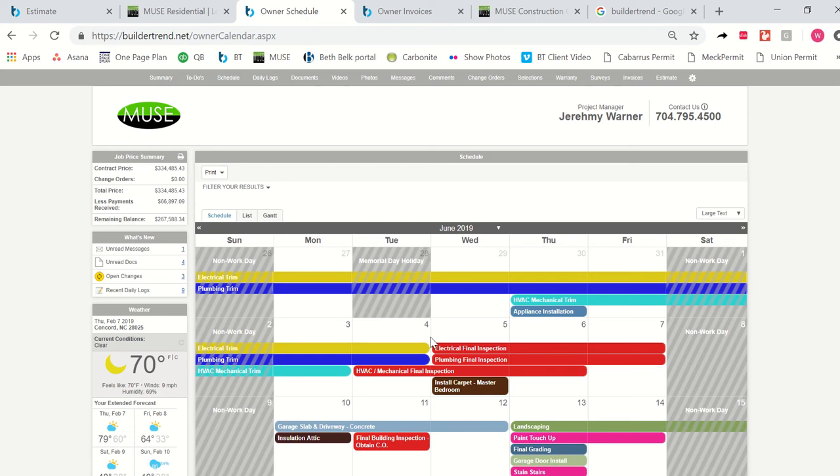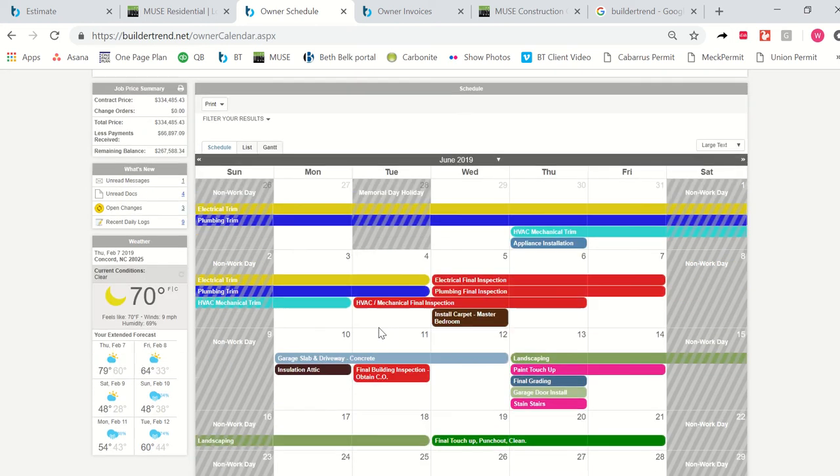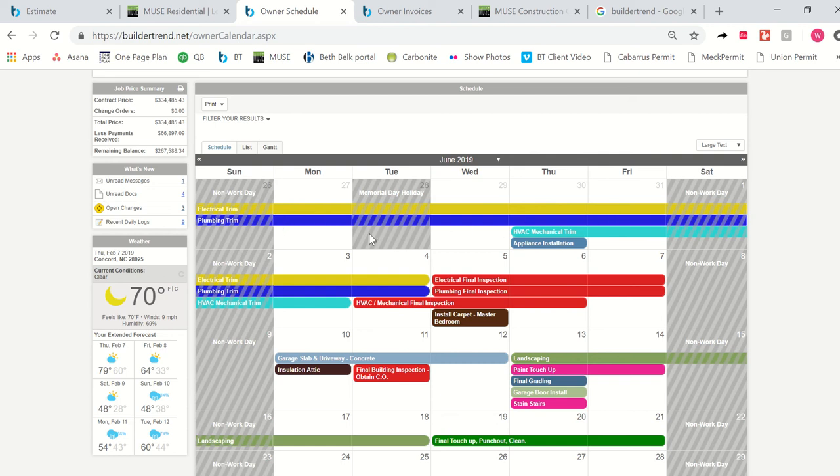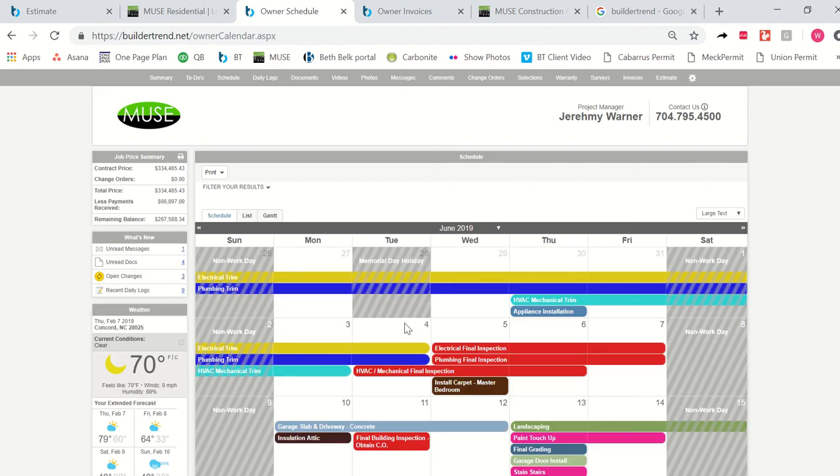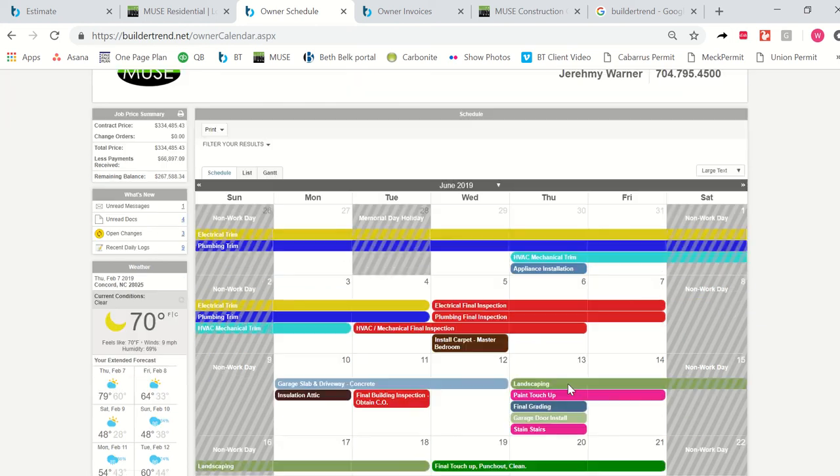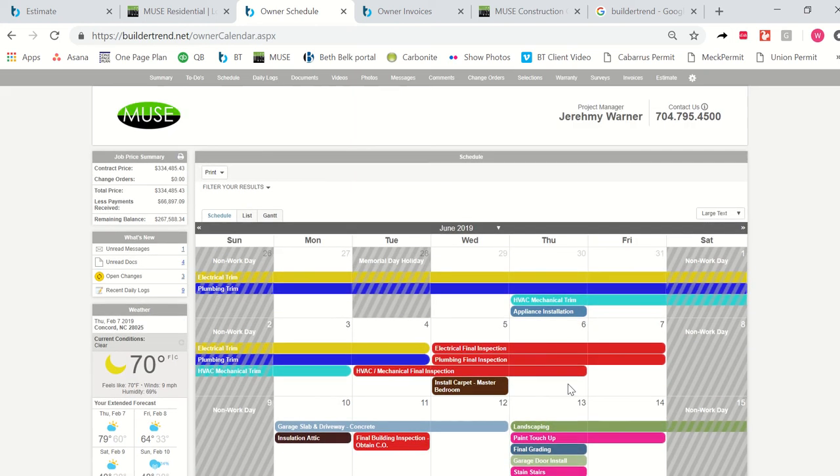What I always remind people about this is that this is more of a framework for your job than a day-to-day schedule. For instance, we may have plumbing trim listed here on this big job. It's listed for over a week. That doesn't necessarily mean that the plumber is going to be on your doorstep at 8 a.m. every single morning. It just means that this is his window of time to get his work completed in order to meet our deadlines. So we will be in and out of your property during these times with the appropriate subs to make sure that we're meeting the deadlines that you see here on your schedule.